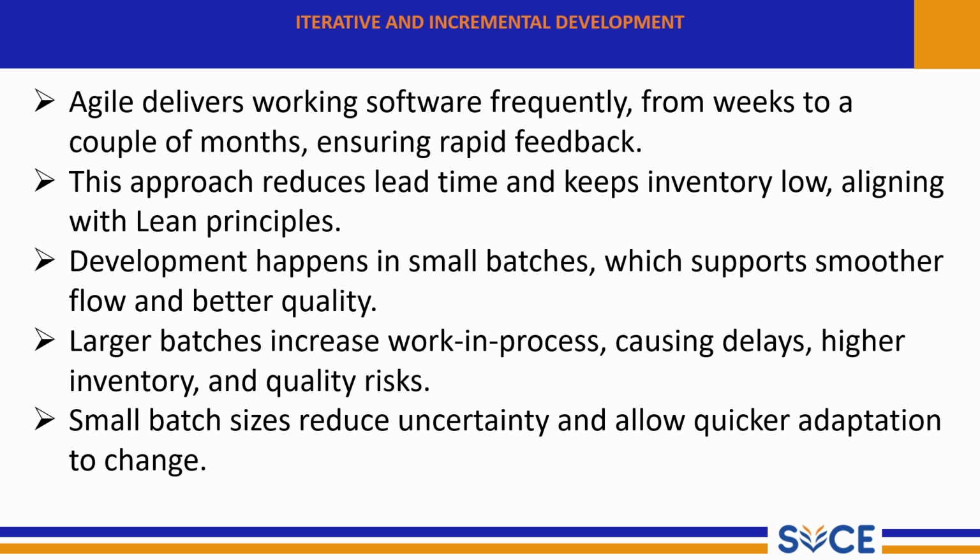Small batch sizes reduce uncertainty and allow quicker adaptation to change. By working in small batches, it becomes easier to change directions whenever needed. If customers' requirements change, it is easy to adapt because only a small part of the system is affected. This keeps the project flexible and responsive. So, iterative and incremental development is a key Agile practice that improves flexibility, reduces risk, and increases customer satisfaction.